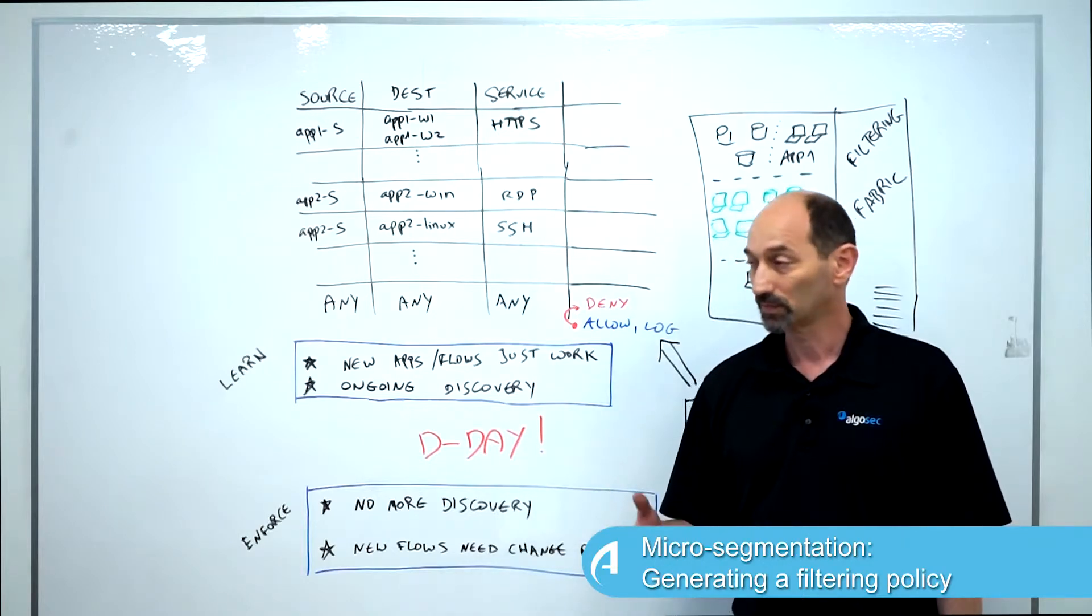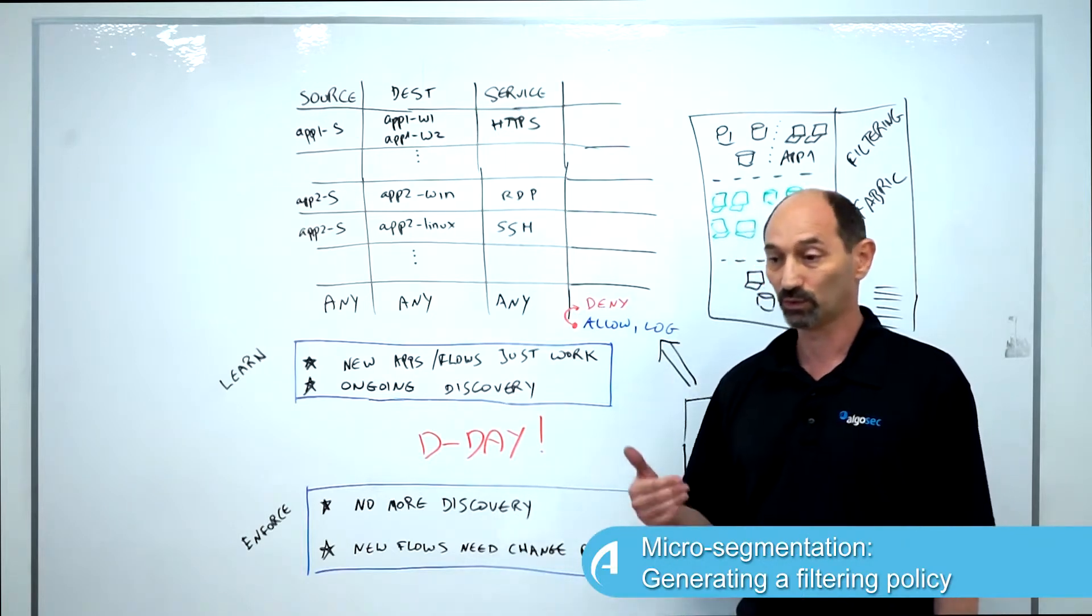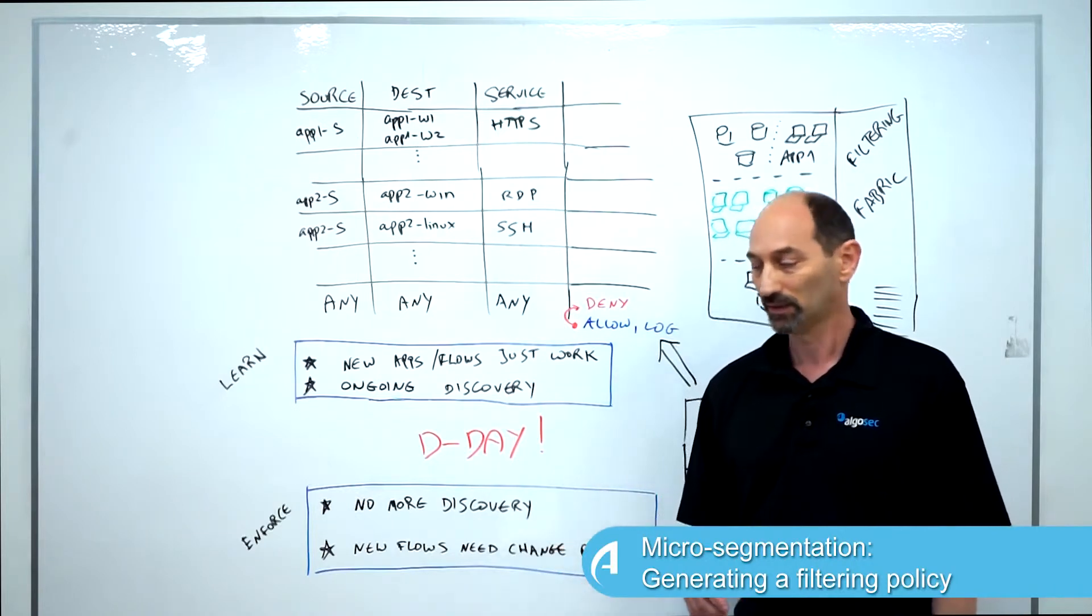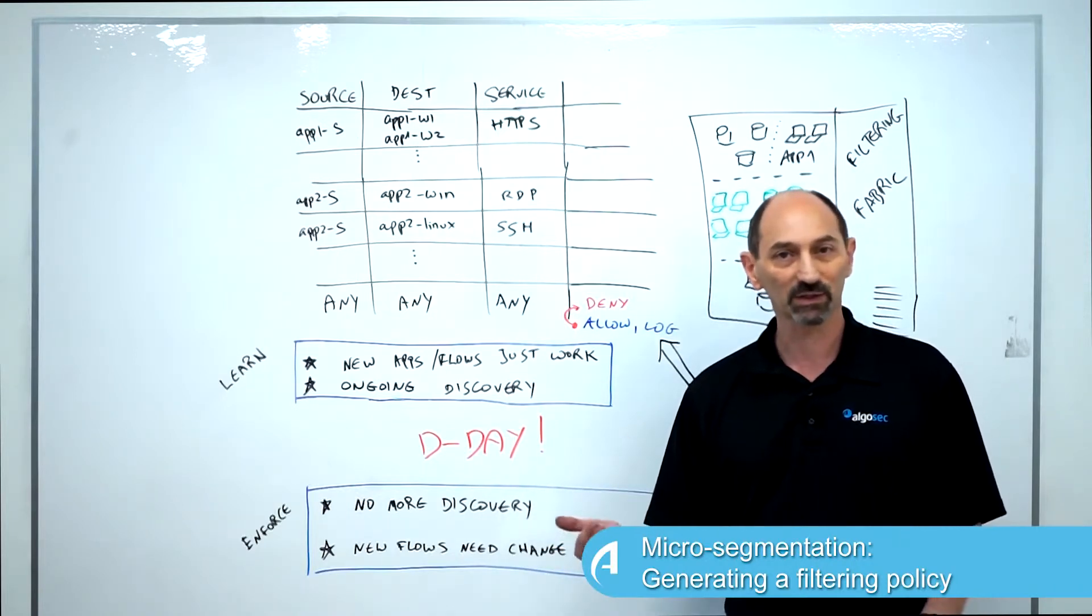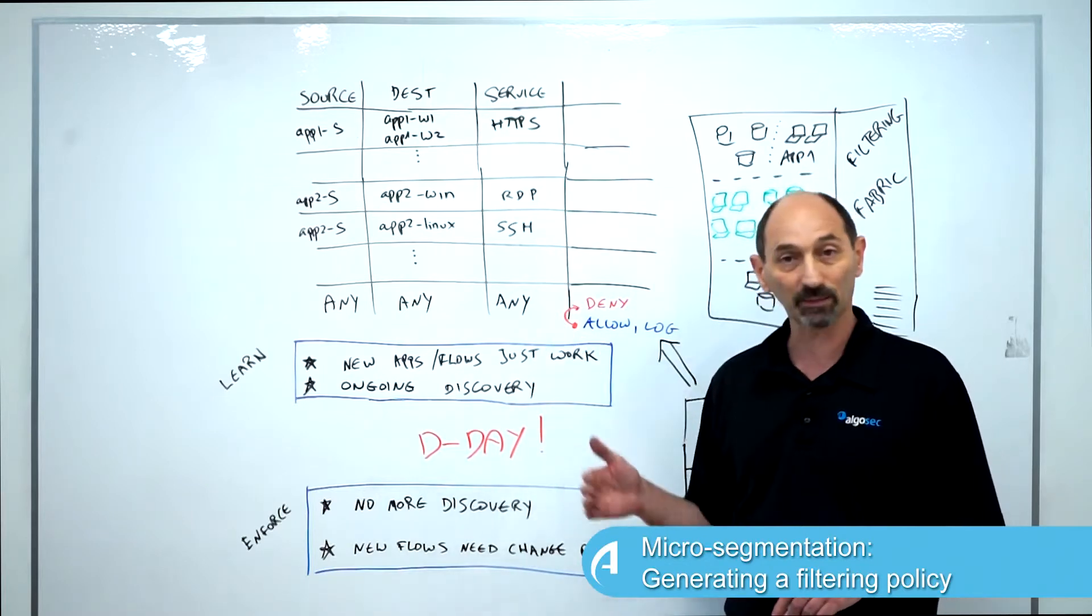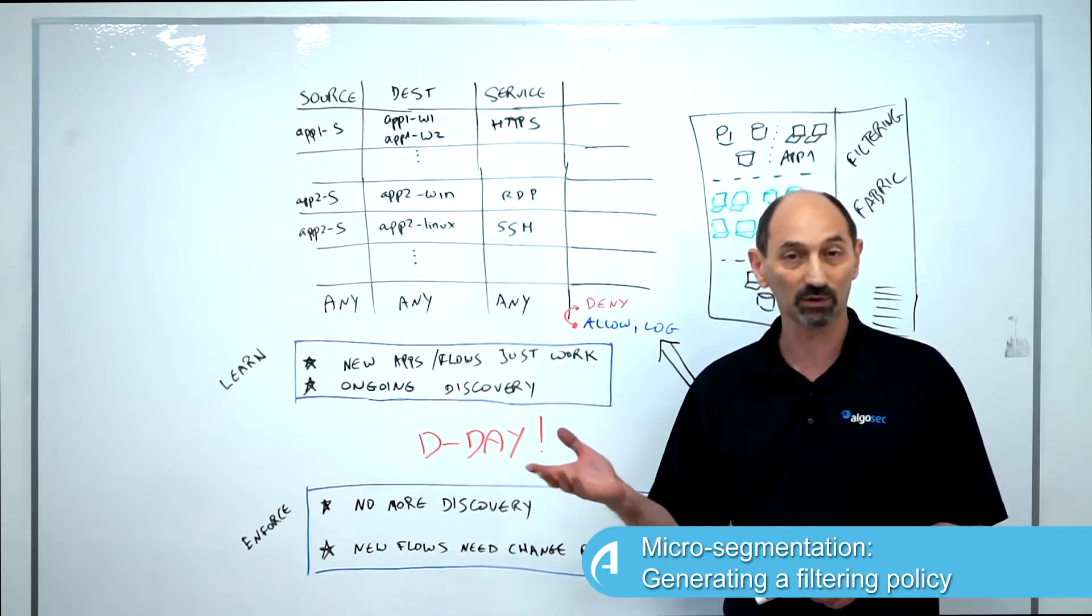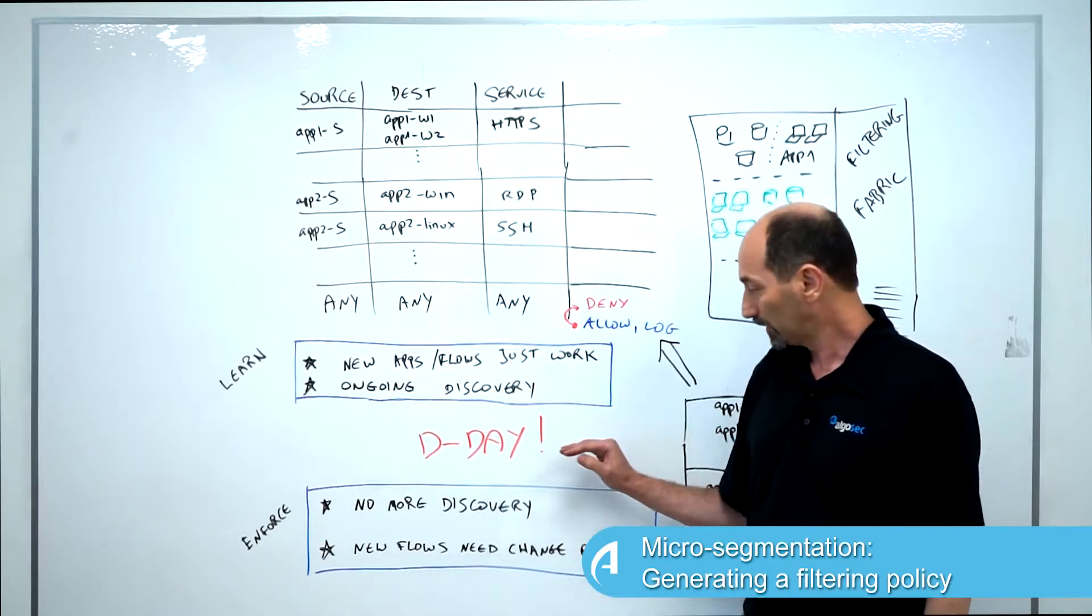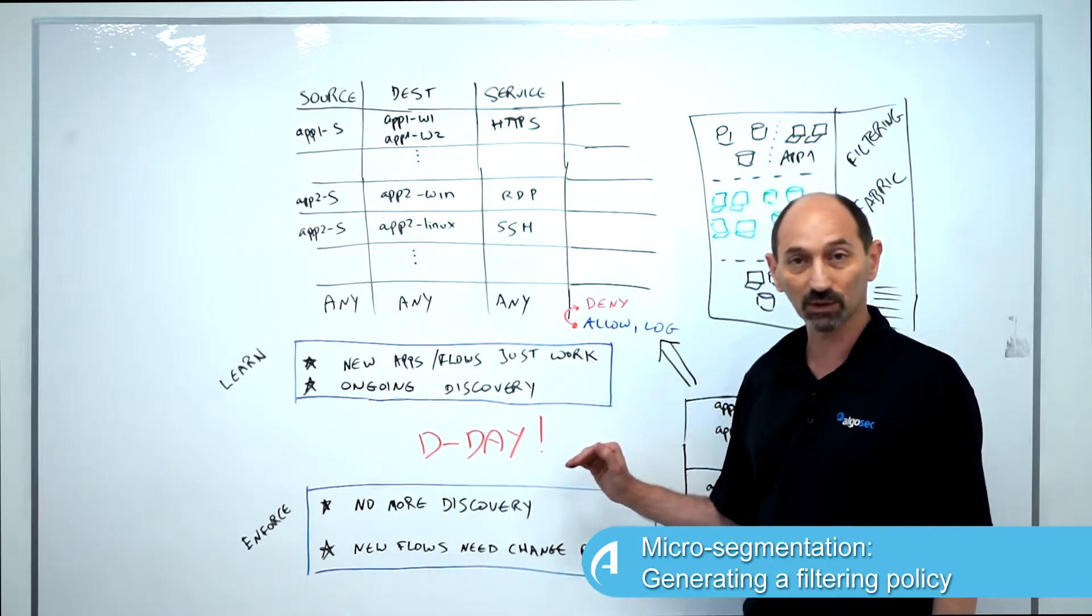When you have such a change, you need to be prepared. You need to communicate. You need to get management approval. You need to set a change control window. You need to notify everybody that this is happening. Possibly during D-Day, you need to have all hands on deck because maybe you missed something and applications will break. So you need to man those help desk phone lines. This is a major event. It's a milestone in the project.